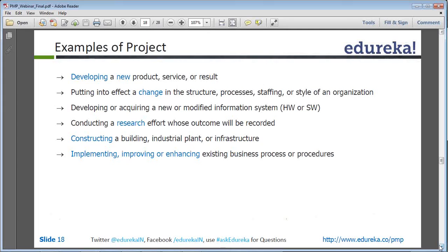During continuous activity, if there are certain things like, let's say there is a new change request which needs to be worked on, and the change request is of substantial nature, which has to be properly planned and executed as an independent activity, now that becomes project management for that project.